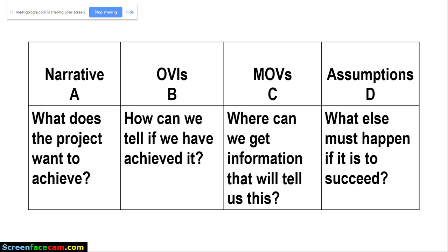No, not necessarily that way, but you are almost there. I do agree that prior to the initiation of each project, of a program or a policy, we need to do what is called a baseline evaluation, so that we know the status of the problem at that particular point in time. So that as we move on disseminating our activities, we are measuring, are we making progress or not? What we've achieved now, then we do a comparison with the baseline. If the baseline holds that HIV stood at 14.4%, then our goal is to reduce HIV prevalence.